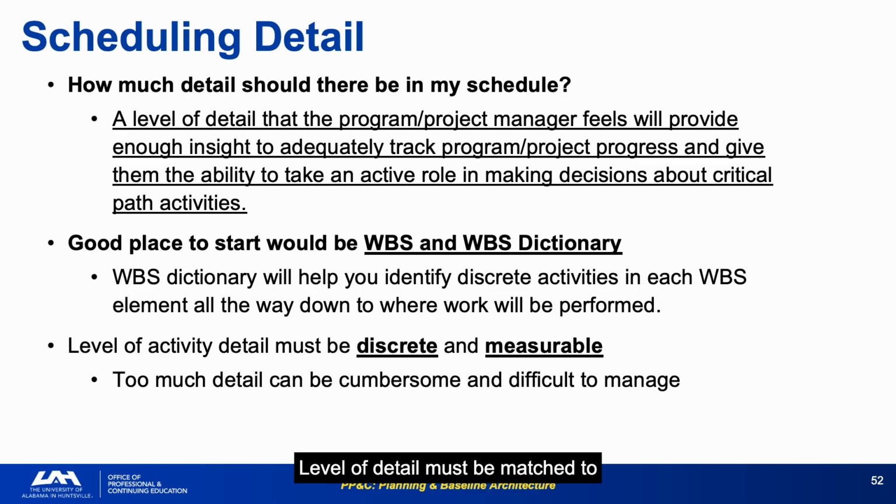Level of detail must be matched to the project's need for control, not so high that the schedule becomes unmanageable, and not so low that it cannot identify problems before they cascade. The WBS dictionary will help you identify the discrete activities in each WBS element. If the dictionary is good, you already know how detailed the schedule needs to be at each level.